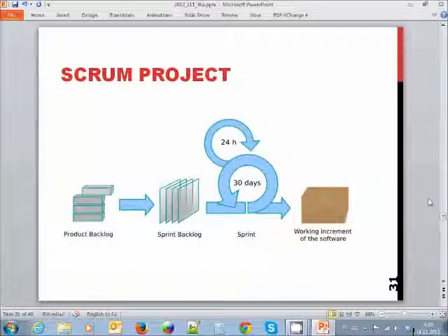So the Scrum project doesn't actually give any restrictions or methods on gathering requirements. The requirements or use cases or just list of things we want from our product or what the customer wants is organized into product backlog. It means that it's just list of requirements or list of features or list of whatever put into these sets, which can be done in one Scrum sprint during the 30-day cycle.